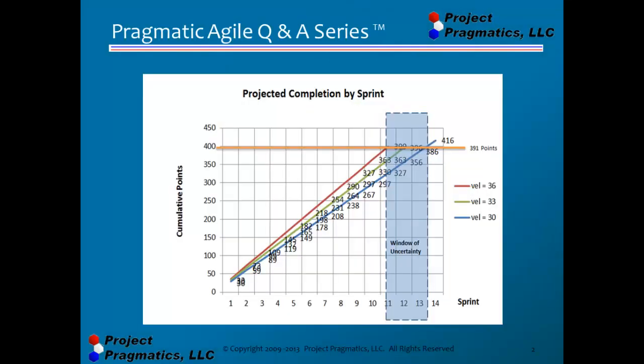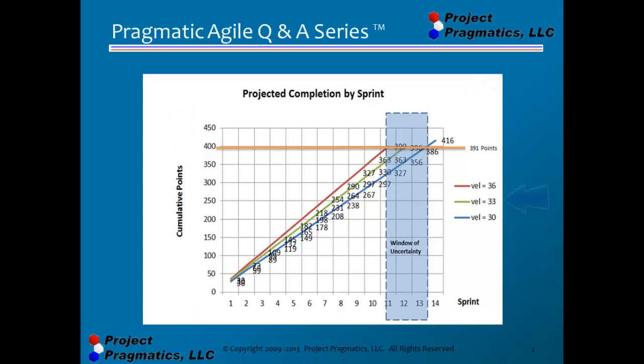Here you see a plot of cumulative points. This is the total number of points in the product backlog, reaching up to its maximum — in this case, 391 points. You see three velocities. At the time this chart was made, the velocity of the team was 33, and that was about sprint 3 or 4.